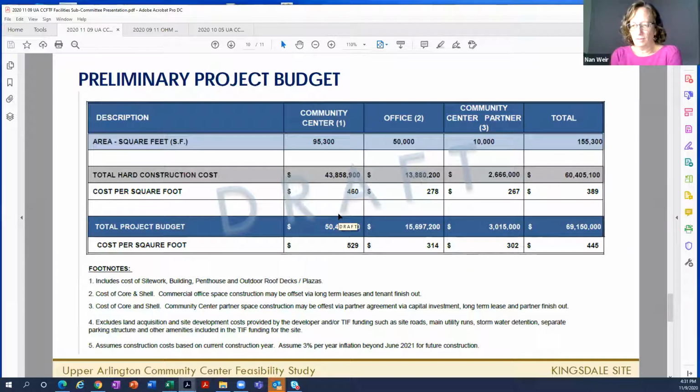Some of the other costs, there are required inspections during construction. There may be some soils or geotechnical reports, and some owner contingency to carry on the project itself, just for some unknown or unanticipated costs. Because there's usually something that comes up when you're excavating the site. The contingency is not really intended for when you want to make a change in the program. That would typically not be included as part of that contingency, but just something unknown that comes up.